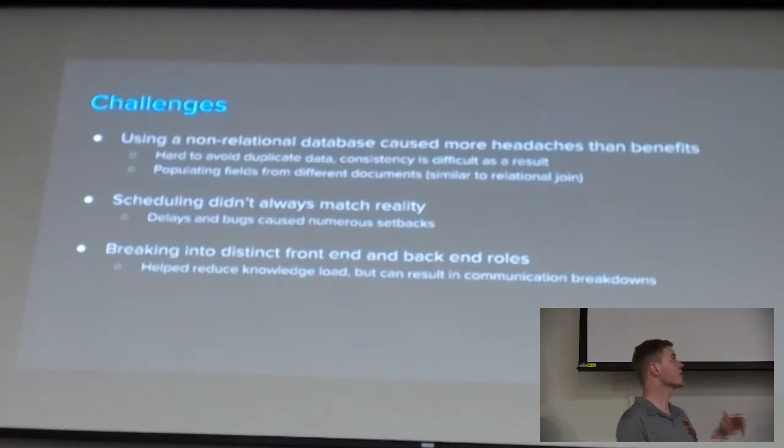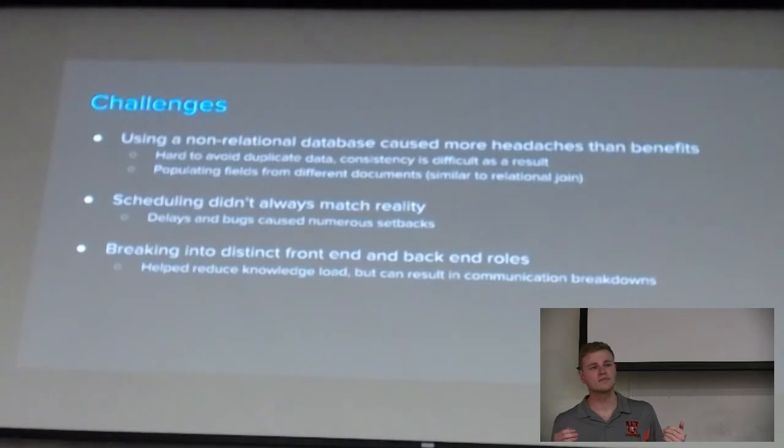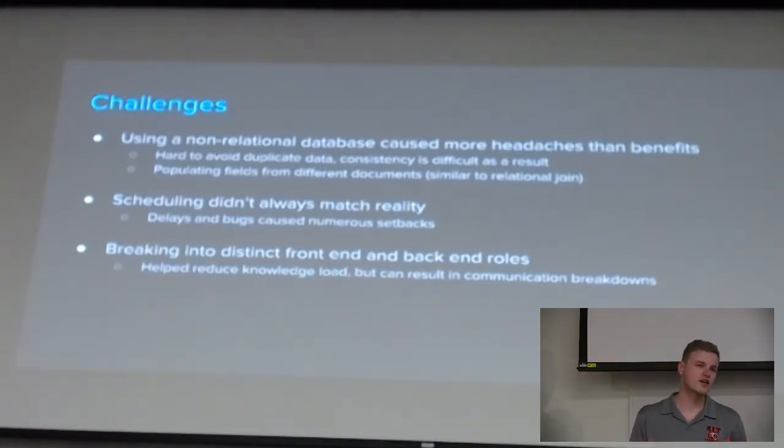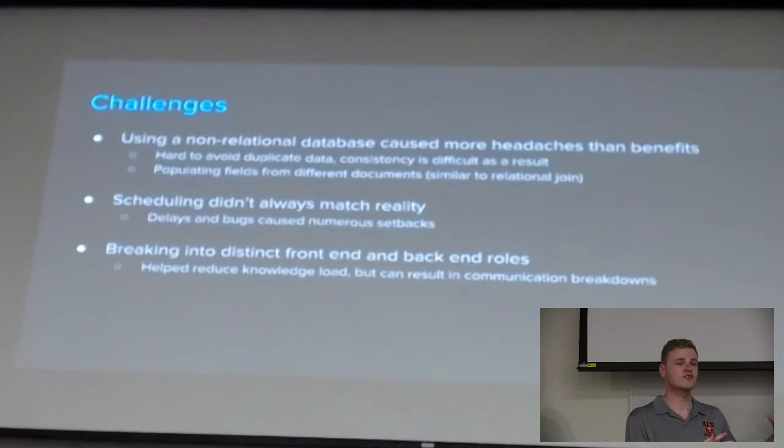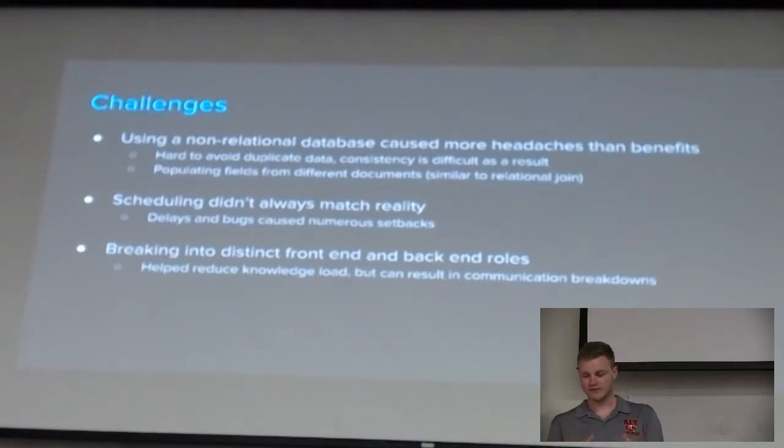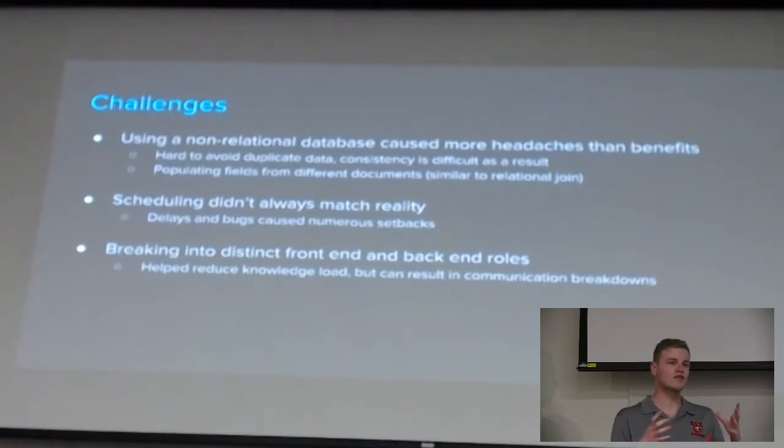And that kind of leads into the next 2 points, which were scheduling and the teams that we broke into. So originally we scheduled to finish development by the start of April, so just sometime just after spring break. And as we got closer to that deadline, we realized that although most of the features on the back end were done, the UI was kind of lagging behind because we started a little bit later on that.